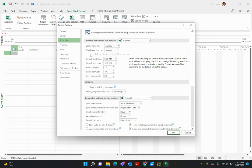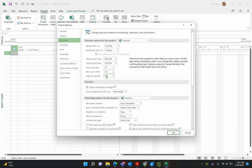It can get tricky with all the math and stuff like that. So obviously you've got to do 37 and a half hours per week. Days per month, we'll leave that at 20. That's how Microsoft Project calculates a month as four weeks. It's just the hours within those days are shorter.